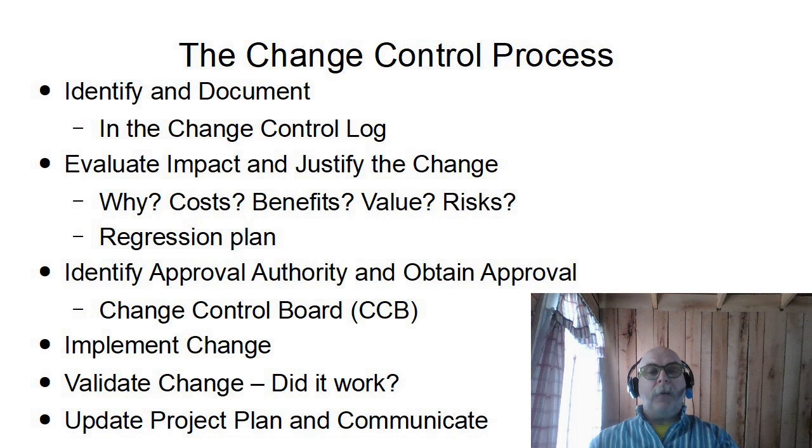Evaluate the impact and justify the change. Why? What are the costs? What are the benefits? What does it add to the value of the final product? And what are the risks? Because with every change, there are probably also risks. What could this change potentially affect? Could this change impact other work packages? Could it negatively impact delivery date, cost, all kinds of things? So, what are the risks? And we need to also potentially, for some changes, have what's called a regression plan, where we plan how to undo the change if the change is really detrimental.